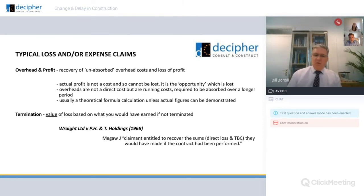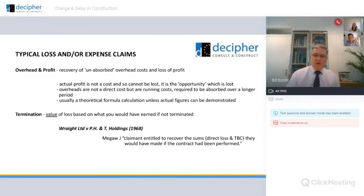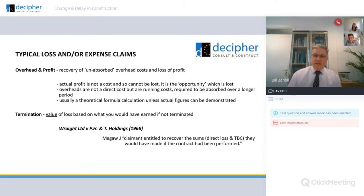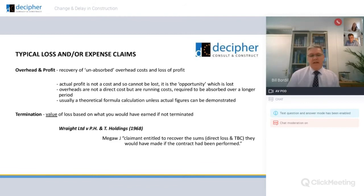There's a win-win here for contractors: if you can't make the contract rates stack up — i.e. if you're losing money at your contract rates — under the JCT you are able to claim your actual costs. So it's loss and/or expense, and that would be under the heading of expense.